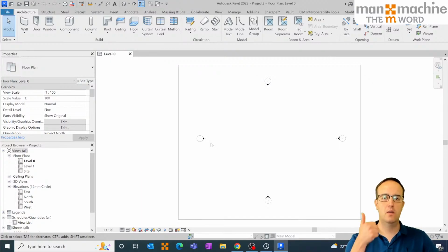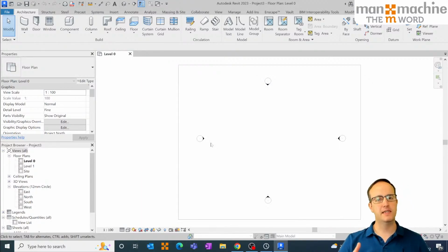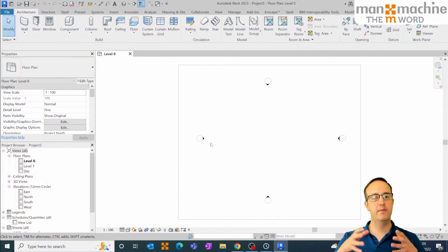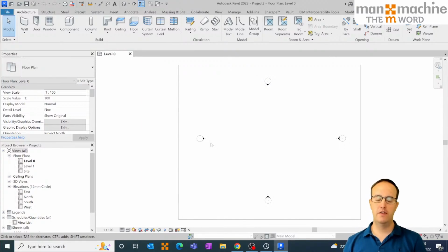So we're looking at: what is the component? How can I identify it? Where can I find it in the building? What's its serial number? What's its warranty information, and stuff like that. Yes, a client might ask for a little bit more or a little bit less, but it's that kind of information that we want to attach to components within our Revit file and then push them out into a very, very specific format. So to start this off, I'm just going to draw a really simple room.